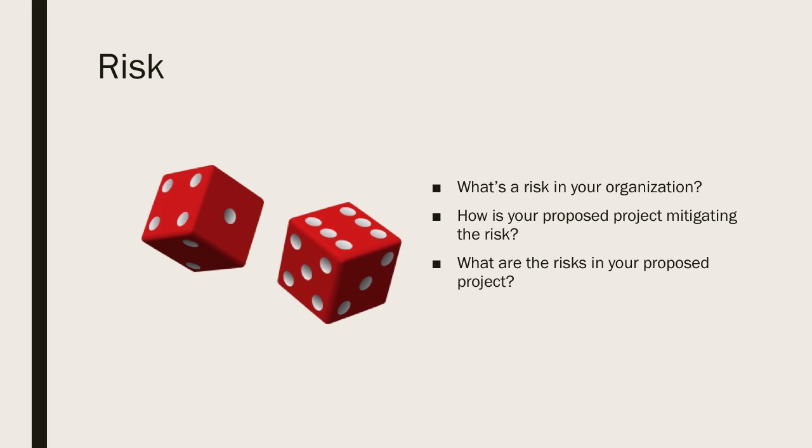It's imperative that you understand how your organization defines risk. You might have gone through courses, whether internal or at school, about what's a risk versus an issue. The VMware cluster going down is an issue. The potential of the VMware cluster going down because you lack enough memory in your cluster is a risk. So let's say we want to propose a project in which we increase the amount of RAM in the vSphere cluster. We've identified a risk. Something hasn't happened, but something can happen.